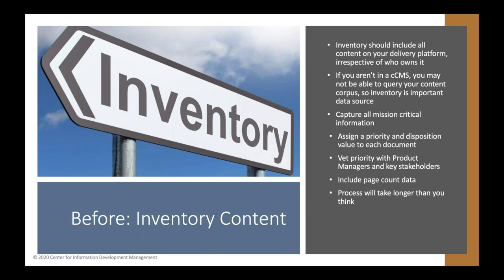If you've never done a content audit or a content inventory, you should count on at least 3 months to create one. And it'll take longer if you need to get input or buy-in or sign off from other key stakeholders, such as the developers, the product managers, or even your legal organization. It's kind of like having your kitchen redone. It always costs more and takes longer than you think it's going to.